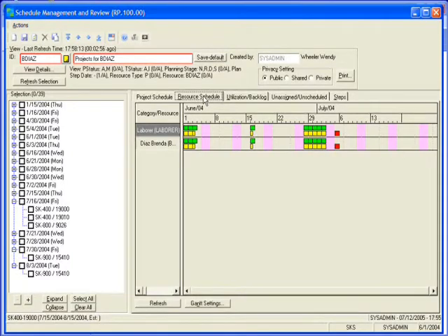Well, we could ignore the red block, which would obviously be the easiest thing to do. We could also change her capacity on that day to make the red block turn orange. So really what you're saying is we would make her work that day, and then we can just show that we have no overloads. Okay, sure. Let's go ahead and do that.